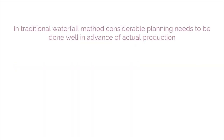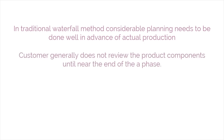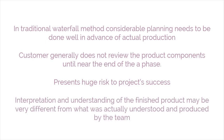With other methods, such as the traditional waterfall model, considerable planning needs to be done in advance of actual production. And the customer generally doesn't review product components until near the end of a phase or the end of the entire project. This method often presents huge risks to the project's success, because the effect of each risk may be amplified through its impact on several developmental processes, and thereby may have more potential for significantly impacting project delivery and customer acceptance. The customer's interpretation and understanding of the finished product may be very different from what was actually understood and produced by the team, and this may not be known until very late in the project's development.